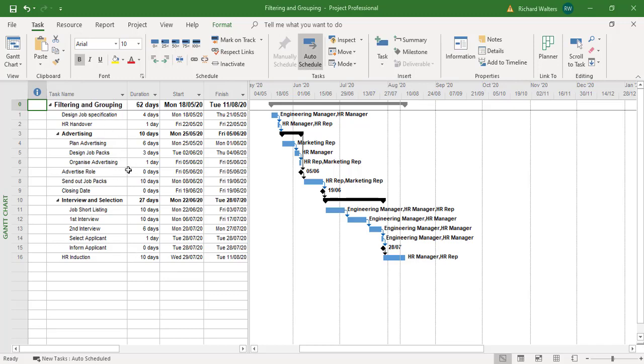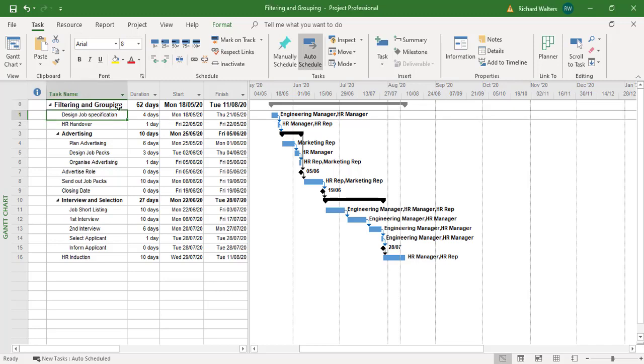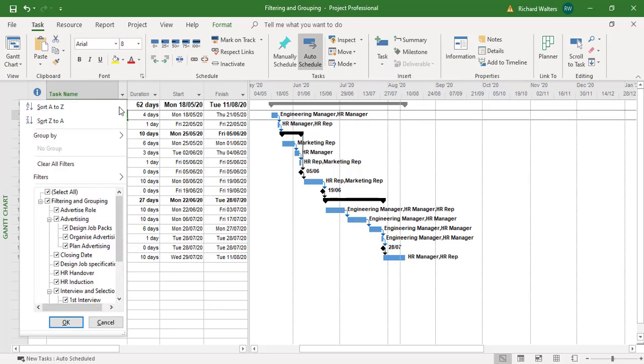For example, we might want to filter by any task that contains the word advert for advertising, advertised role. So it could just say show me everything that begins with the word advert. So I can just click in the column, go for the drop down arrow.